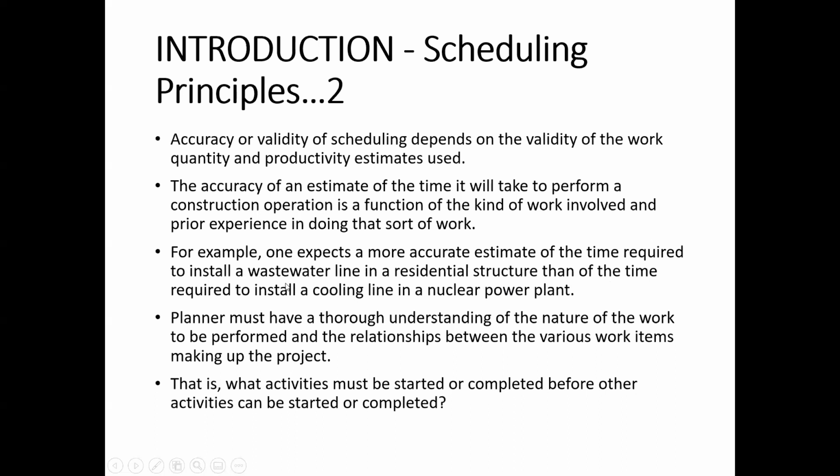You can see that a nuclear power plant is a very complex project compared with a residential project. If the same type of activity is performed in a residential project and in a nuclear power plant project, the estimate would be much more accurate in the residential project, because that is a relatively simple project.